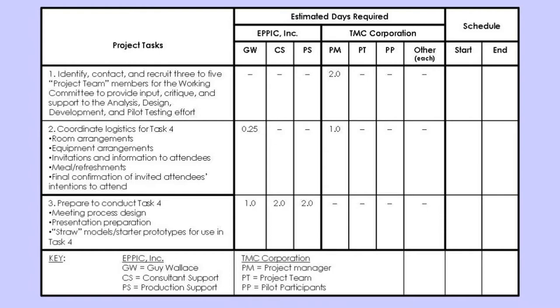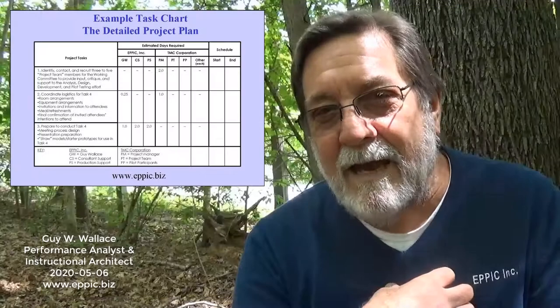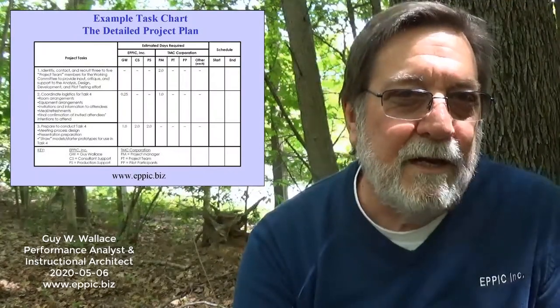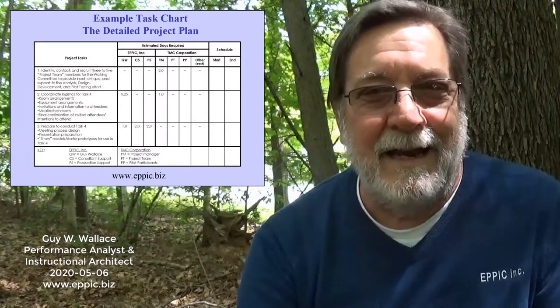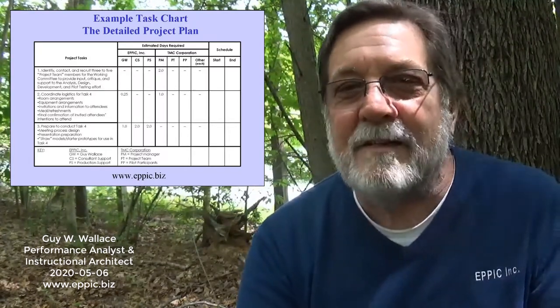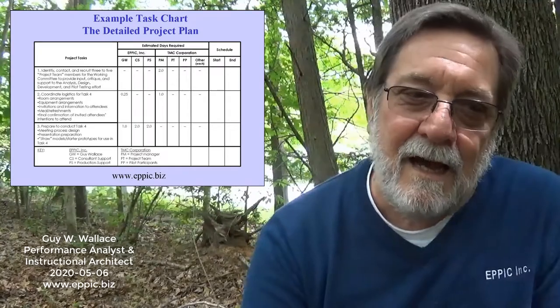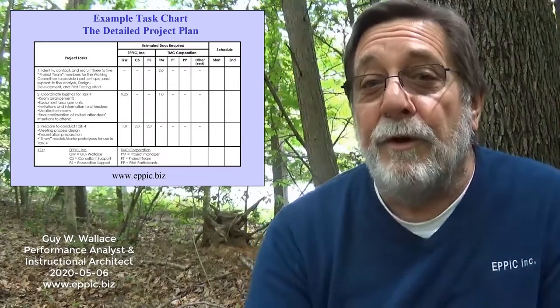I only do the schedule on the things that need to be scheduled, because people need to come together for phone interviews or for a face-to-face meeting or a virtual meeting to conduct the analysis and/or design. I don't schedule every task because I have to provide some flexibility. In my organizations in the past, any one of the consultants would have been working on 4 to 7 projects at any one time, and I need to give some flexibility in terms of how they get some of these less critically scheduled tasks done.